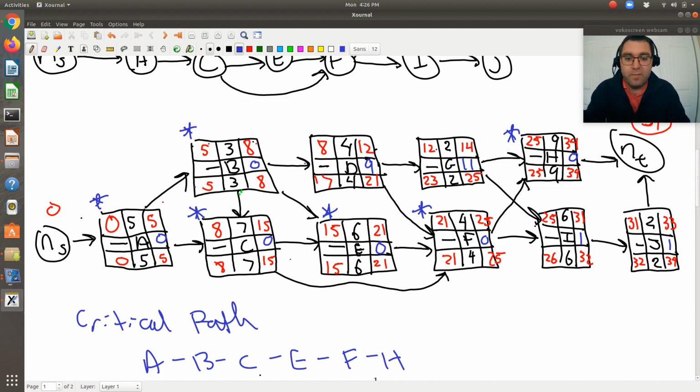So there's our first critical path method, where we identified our critical activities and then that critical path to go from our starting point to our terminal point. Those are all our activities which need to be started on time to make sure my project can be completed on time.